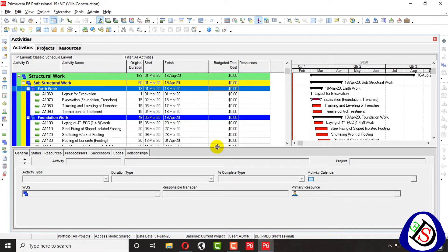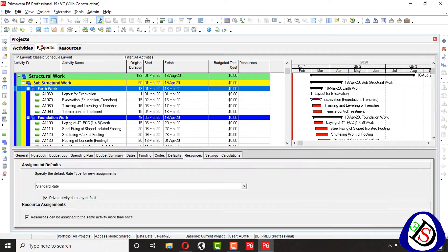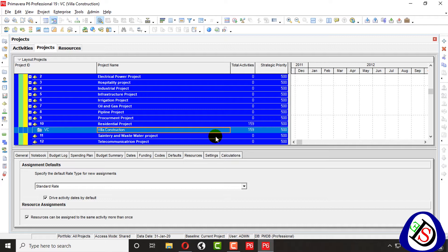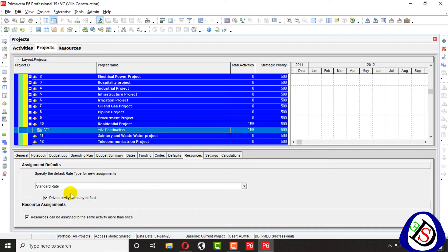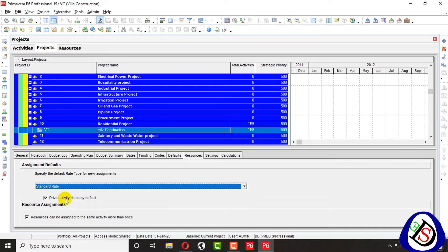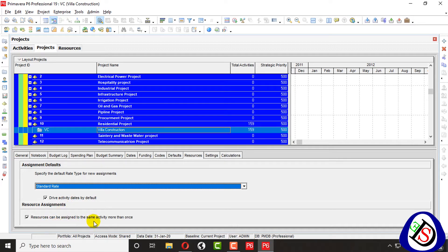You can see my activities are open. I will go for project here, my villa construction project I have taken this project for my course. So here you can see I will go for resource tab and here you can apply standard rate for calculation of cost or for assignment role for resource assignment. So here you can assign resources, one or more to an activity.